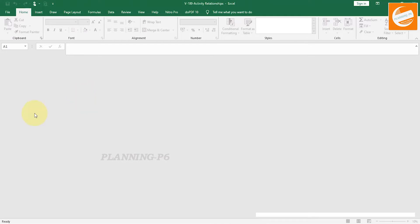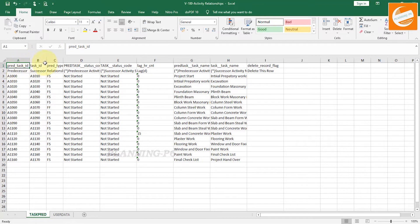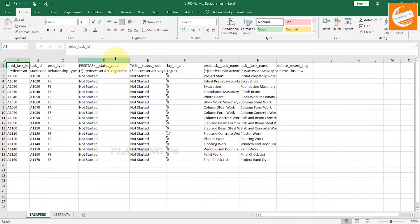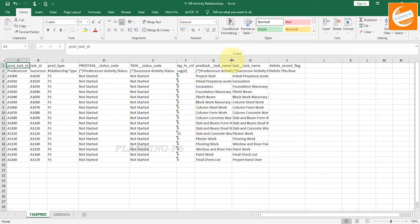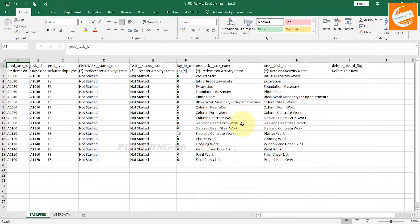You can see the exported file here — 'V100 Activity Relationships'. Open that file. After opening, you can see the activity relationship sheet with columns for predecessor, successor, relationship type, activity status, successor activity status, lag, and the predecessor and successor activity names.